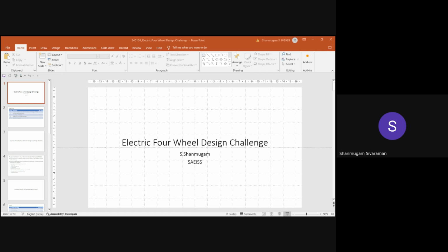If you take a passenger car, roughly about 400 people from, let's say, Renault will work from the Renault side, and another 400 engineers will work from the supplier side. So about 800 people will work in a typical program, if you take one particular model being launched. So this is a team activity. Now, with a team of 800 people, this is done over a 4-year period, roughly.